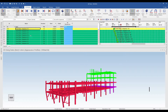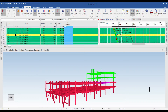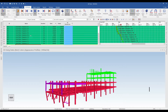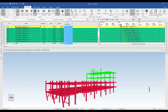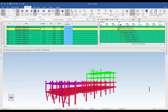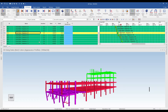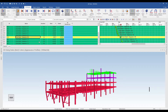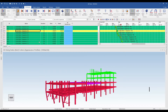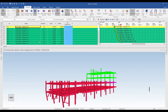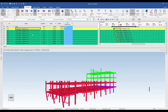On our screen we have our activities, and these activities are for the Steel Erection Sequence. These activities go all the way from sequence 1 right through to sequence 17. As I scroll through these activities, you can see at the bottom of the screen the steel elements linked to the particular sequence get highlighted. That is important because it gives you and the team a good understanding of what is the steel sequence that comes under that particular activity.